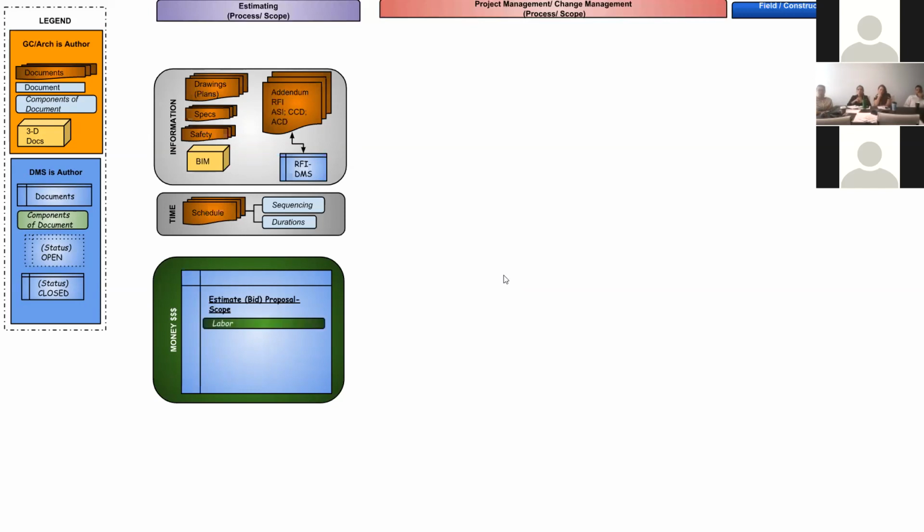Some of the components of the bid are our labor costs, our material costs, miscellaneous costs around equipment or additional resources needed. Could be BIM, could be shop drawings, could be specialty items. And then the overhead and the profit component. Now on this drawing, you'll see that I put labor as a really long bar. Labor is about 60 to 70% of our costs on projects.